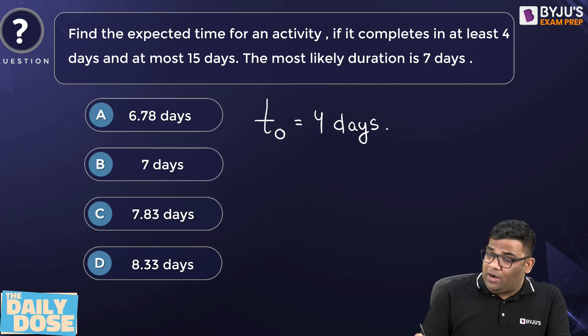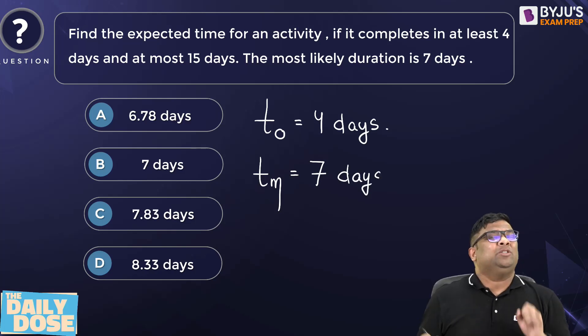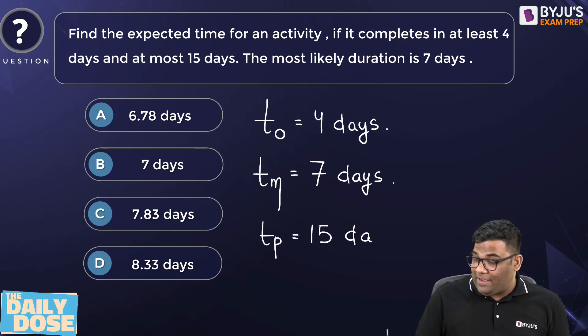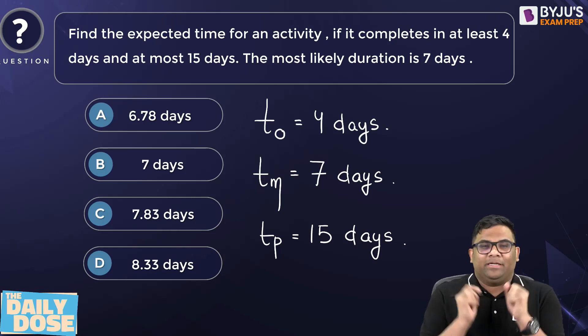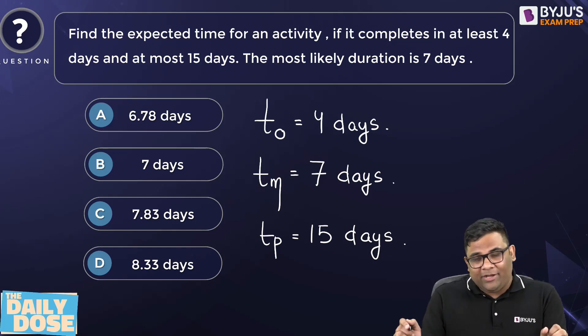Then, most likely is given as seven days. As I told, it is more than your T0. And at most means the pessimistic, which is 15 days. So this is the question. I expect everyone to solve this question and write the answer in the comment section. Thank you very much.